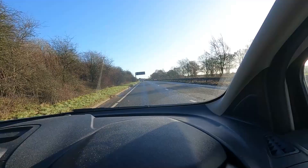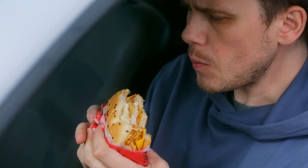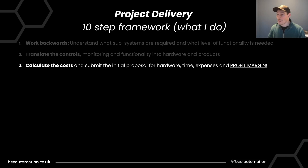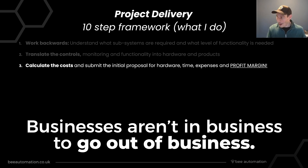Also factor in programming time, on-site commissioning, and expenses like fuel, hotel costs, and food if you're staying away. These are easily overlooked, especially if you haven't done this before. If they're not factored in, the project won't be profitable. And don't forget profit margin — businesses need to factor in a profit margin to stay in business.